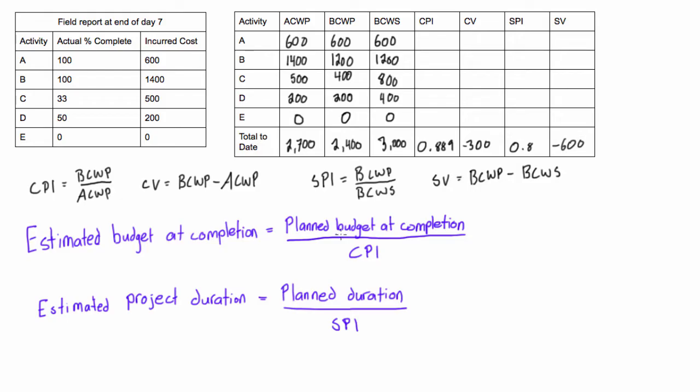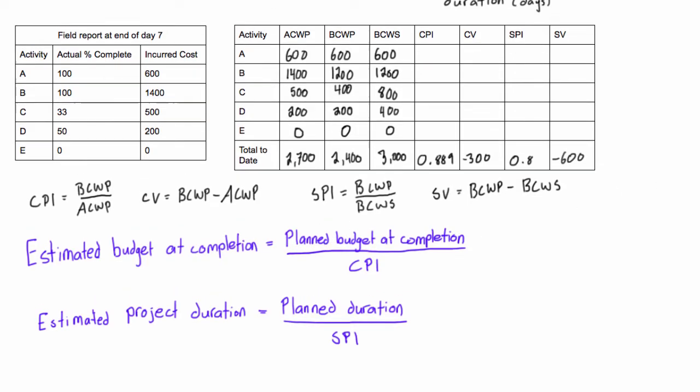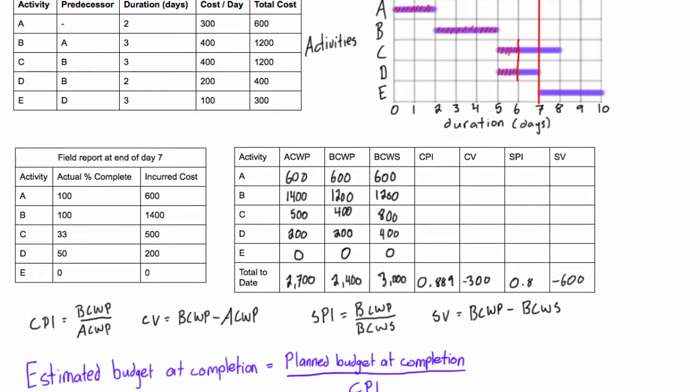First of all, if we want to solve this we need to know what the planned budget at completion is. If we go back up to our table of dependencies here we can see that we had five activities and we know the total cost of each activity. We expect the total project cost to be the sum of all of the completed activity costs. If we add up 600 plus 1200 plus 1200 plus 400 plus 300, we get a total cost of $3,700.